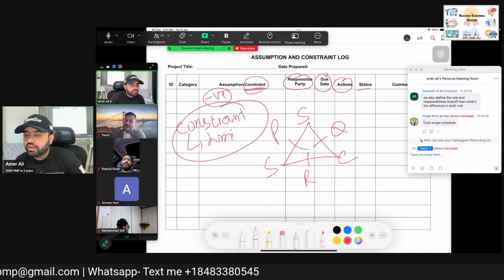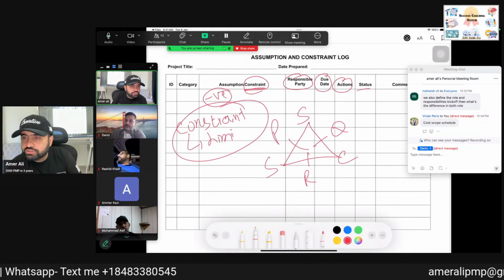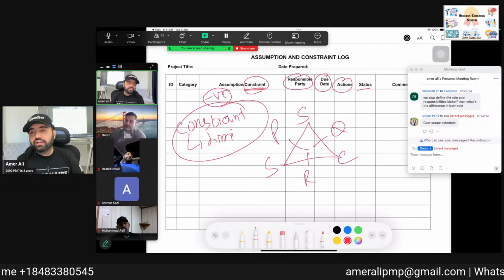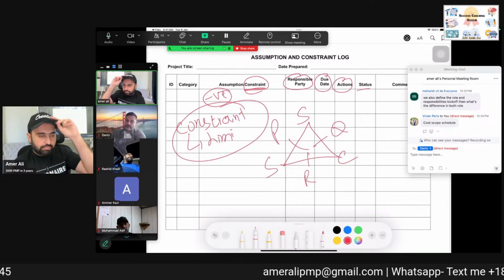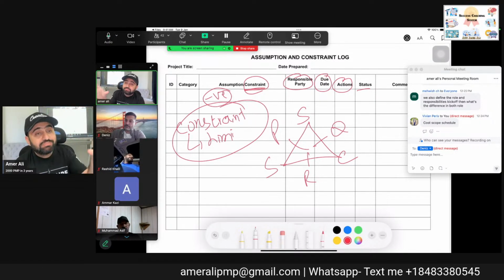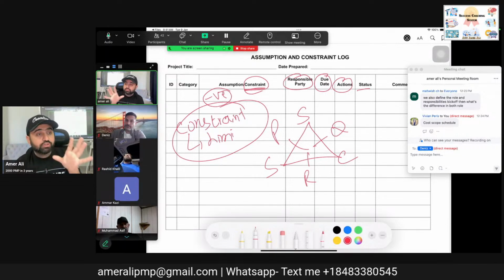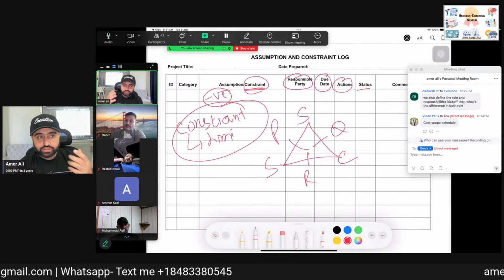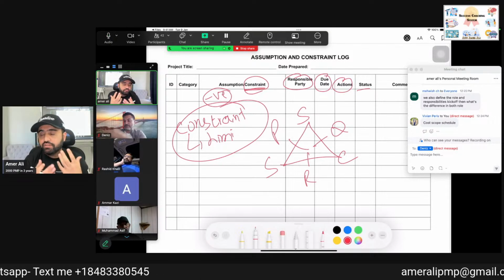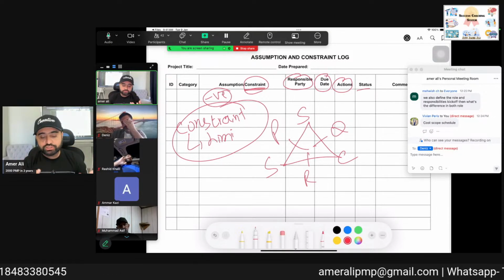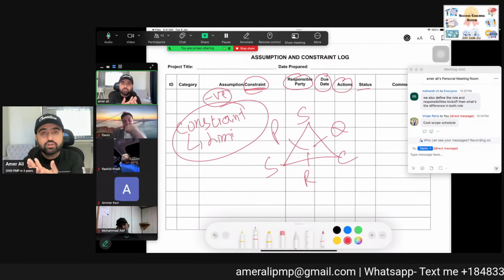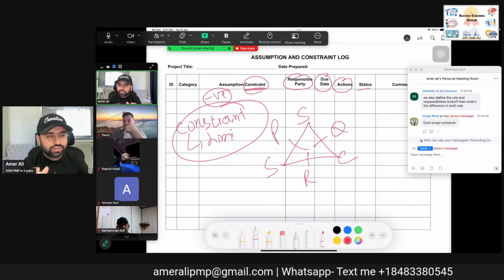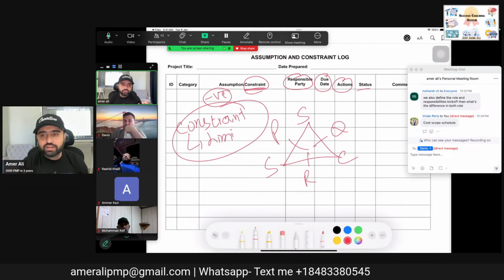Okay. Mavish is saying we also define the roles and responsibility. Yes, the kickoff meeting normally happens once the project management plan is ready. Once the project management plan is ready, then the kickoff meeting happens. The charter is basically, when you get the charter, one of your responsibilities is to share it with the key stakeholders so that they don't go on vacations or are not aware of it.